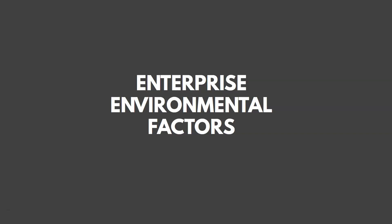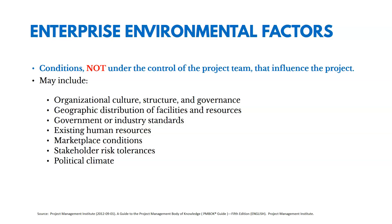Another thing that impacts our projects are enterprise environmental factors — a little different than organizational process assets. These are conditions not under the control of the project team that influence the project and how we manage it. They could include organizational culture, structure and governance, the geographic distribution of facilities and resources, government standards, existing human resources, the condition of the market, and political climate. With organizational process assets, those are oftentimes documentation or databases. Enterprise environmental factors are conditions and situations not under the control of the project team.